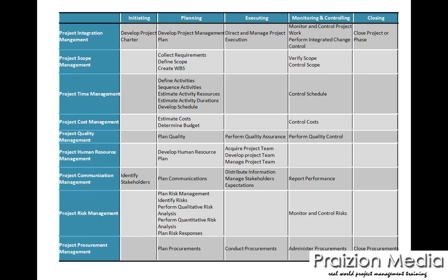Now, not only are stakeholders at times difficult to manage, sometimes their reporting requirements could be hard to manage. Sometimes you have stakeholders who want reports updated throughout the project, all throughout the day, end of the day report. And this is typical on construction projects where stakeholders are very keen on understanding what happened and how quickly the work is proceeding.